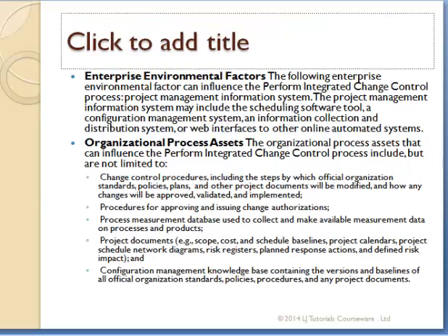So we'll bring in the EEFs and the OPAs. Now, the reason why you should bring in the EEF is this: you do not want to make a change if you do not know whether there's a guideline or a factor that you do not have power over. Like, I've been in a city where big trucks are not allowed to move in the daytime. They are allowed to move between 6 p.m. and 6 a.m. So now, assuming you want to raise a change request that cement should come in trucks in the early hours of maybe the next day, if you go through your EEF, you should know that that wouldn't be possible, since trucks are not allowed to move within the city in the daytime. So that's why you need to bring your EEF on board.